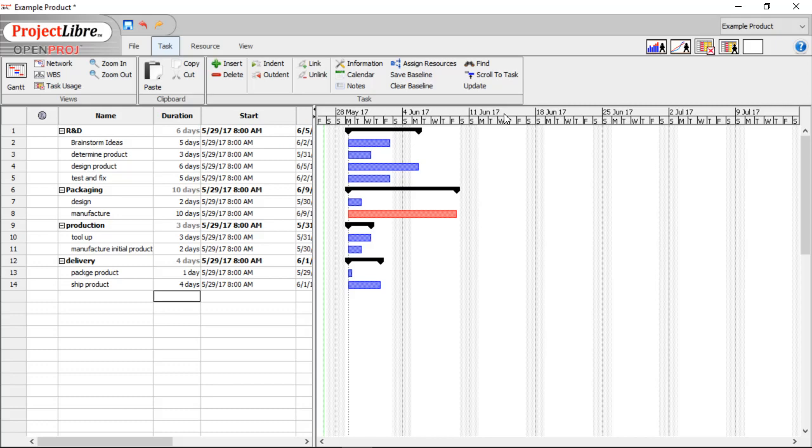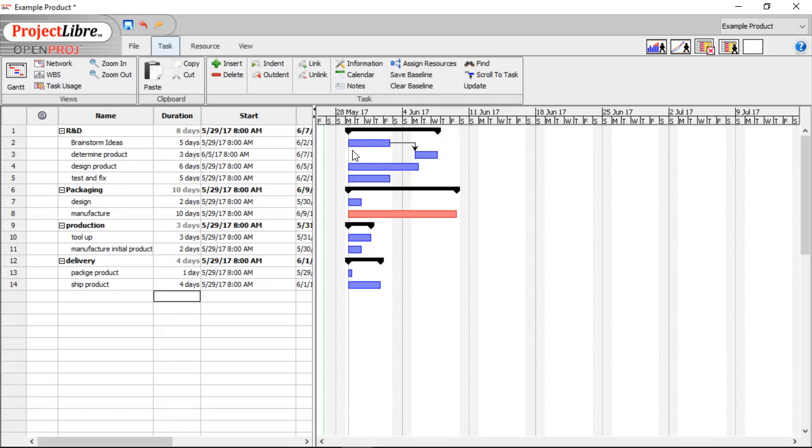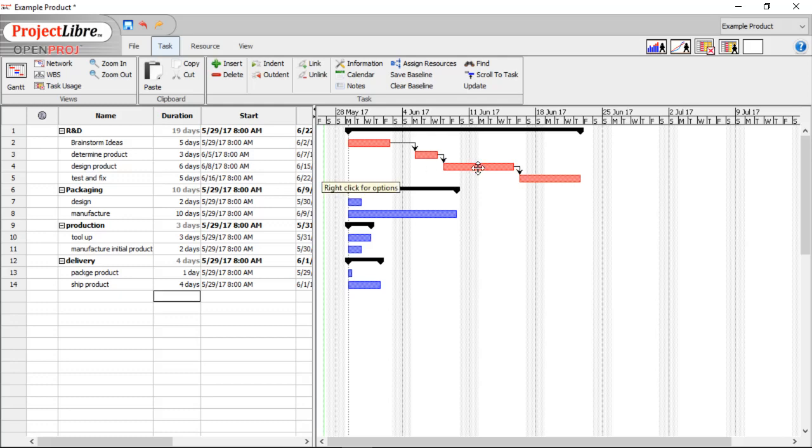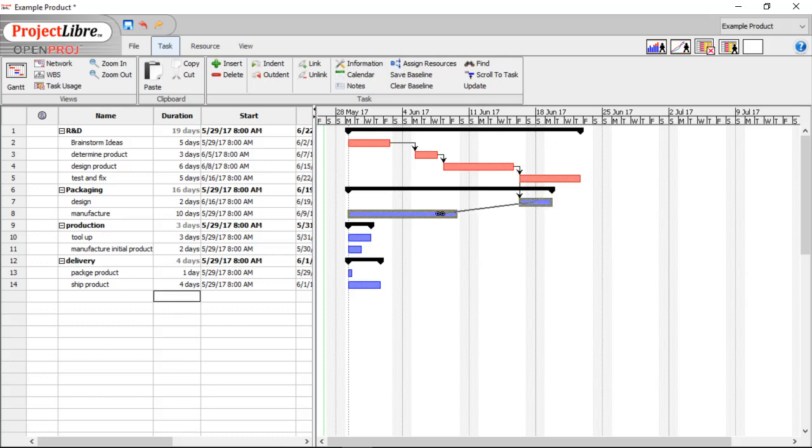The next step is to plan out the sequence of events that need to occur. So let's start off at the top. So Brainstorming, it's going to have to come before determining. Then if we keep on going down, we need to determine the product before we can design it. We need to design it before we can test it and fix it. So the packaging, we can start packaging after we design the product. But we don't have to wait for test and fix to be done.